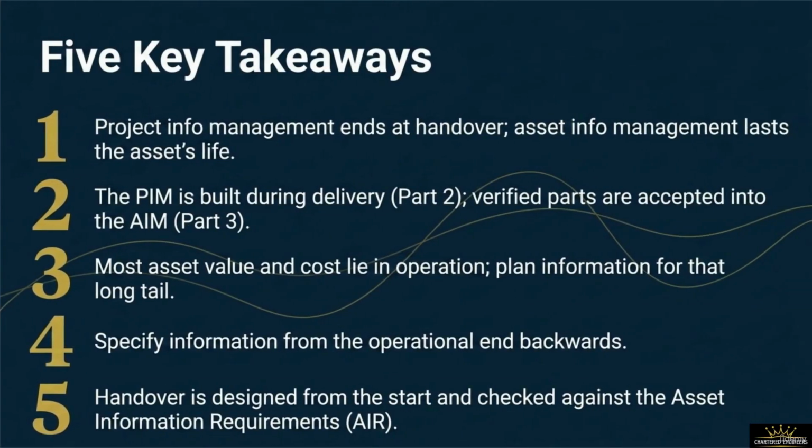We have reached the conclusion of our session on lifecycle information flows. Let's review our 5 key takeaways to ensure these concepts are locked in. First, project information management ends abruptly at handover, while asset information management lasts for the entire operational life of the built asset. Second, the PIM is built during delivery under Part 2 rules, and verified parts are then accepted into the AIM under Part 3 rules.